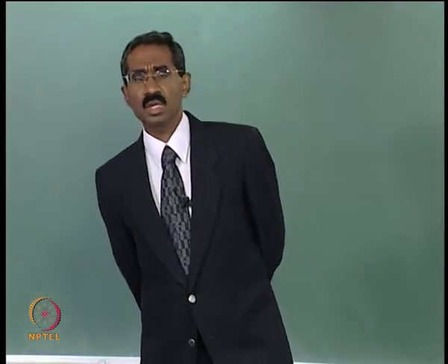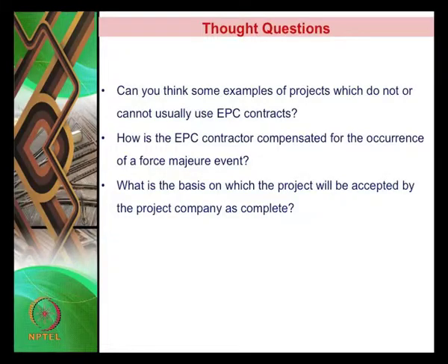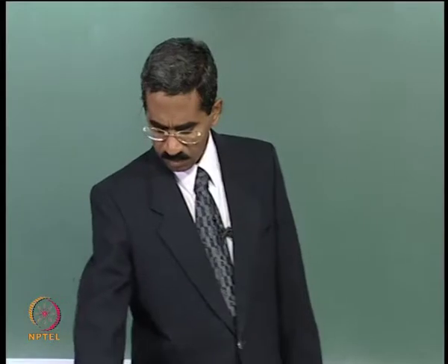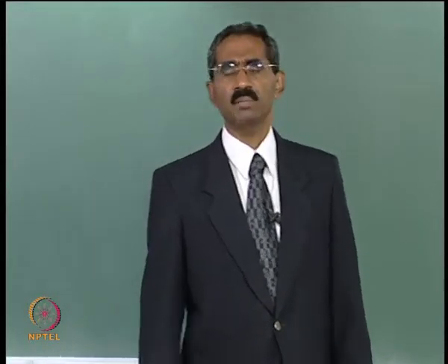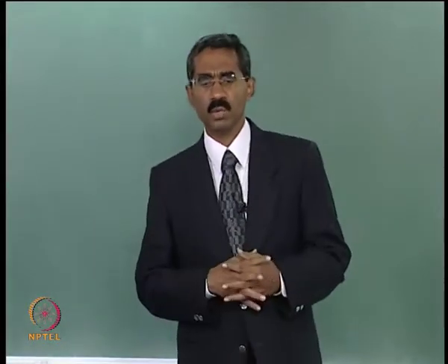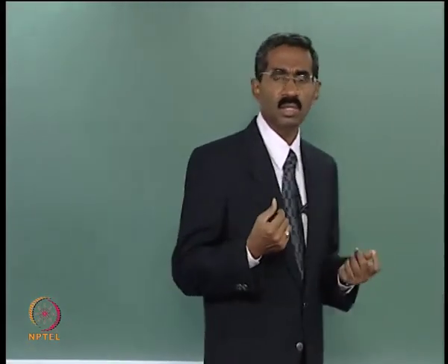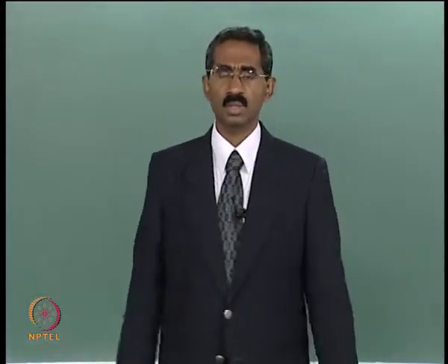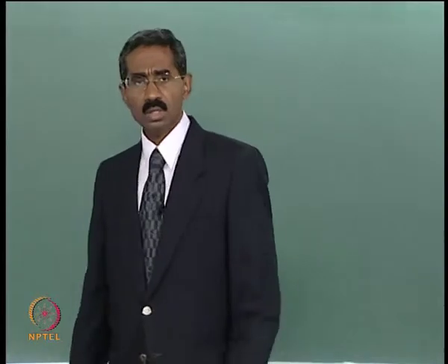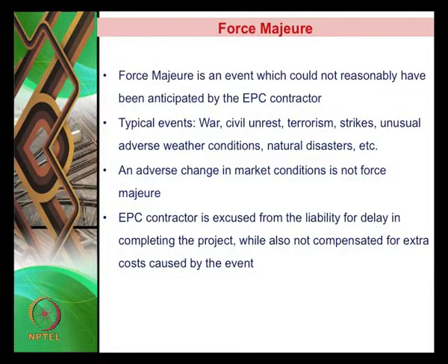The second question that we had was, how is the EPC contractor compensated for the occurrence of a force majeure event? First, let us spend some time to understand what is a force majeure event, and then we will look at how the contractors are going to be compensated. To put it simply, what is a force majeure event? Force majeure event is an event which could not reasonably have been anticipated by the EPC contractor.